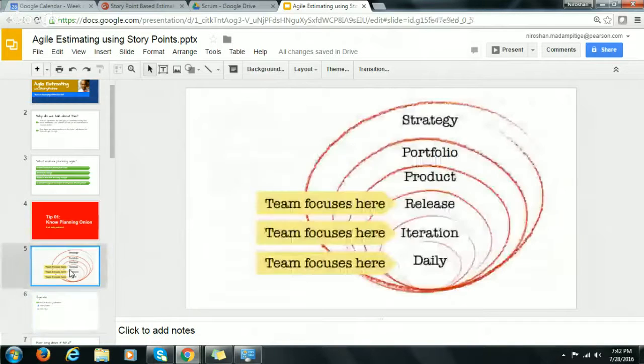So if you go back here, by the time you start doing the product backlog, you probably have thought of a release in terms of a product. One product can have multiple releases. That essentially means you don't need to release everything at once. So you start with the requirement set that is crucial, that is value adding to the business. This can be the topmost priority for the team.